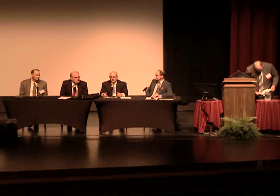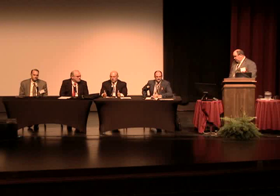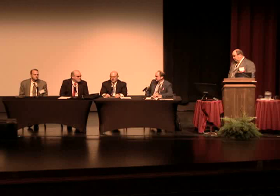One of the issues that we would love to fix is the amount of time that the contractors have to review the project and the location and determine the asset condition for themselves, go into the district and look at the past plans to look at what was built there before and determine those asset conditions themselves. We just haven't gotten there yet as this program has been laid out. We've tried, I think Terry mentioned this, to give them enough time by advertising this project, or at least letting them know as far in advance as we could so they could go look at it and get all the data, and then give them 3 months to actually execute once they were awarded.